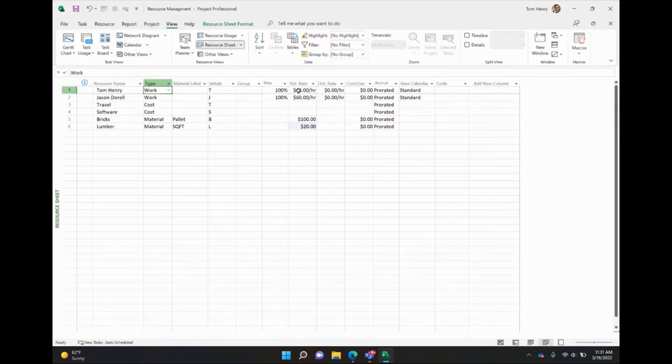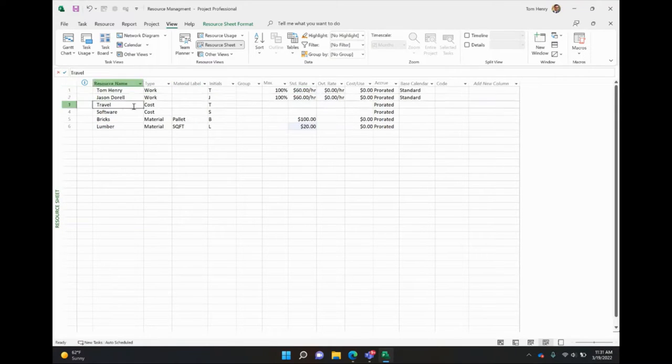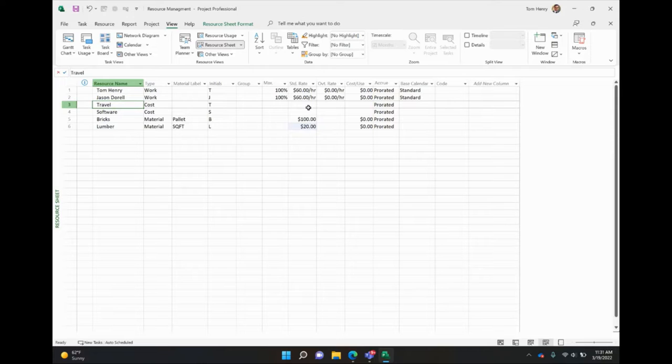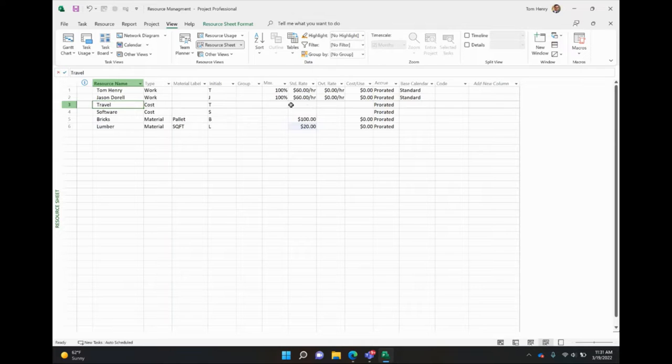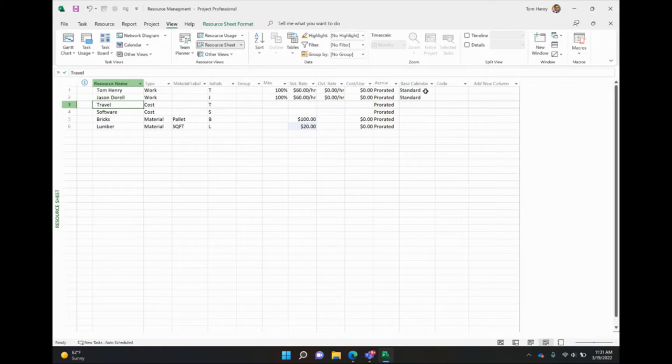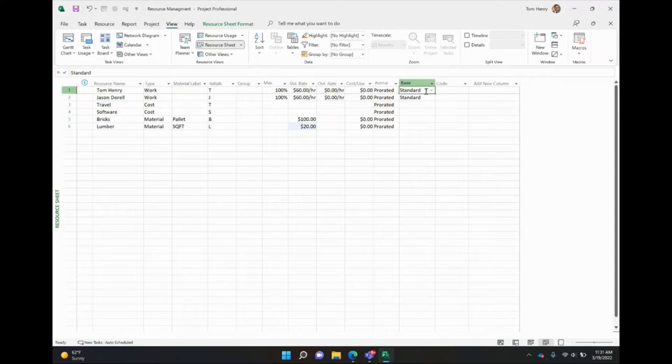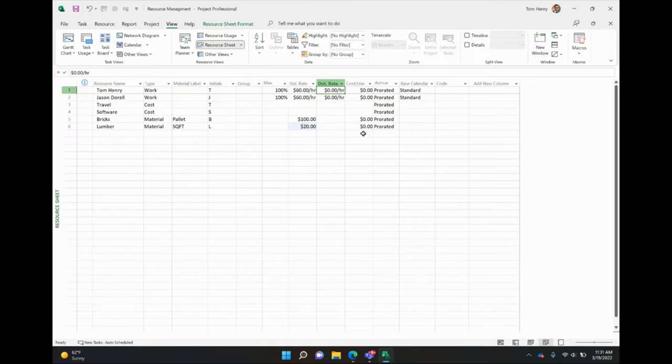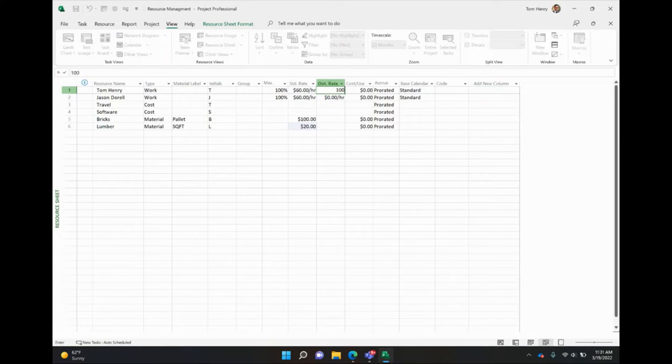Your work resources are prorated, so we charge it out per hour. Your cost resource is going to be fixed. So when we assign the travel cost or the software cost or any other fixed cost that we want to add in here, we will specify what that value is going to be at the time of assignment. So you can switch out the calendars for your work resources. So if they work different hours, they're different rates or overtime rates. So if you say, if they work on the weekends, they get 120, you can do that as well. Maybe we'll give them $100 on the overtime rate.